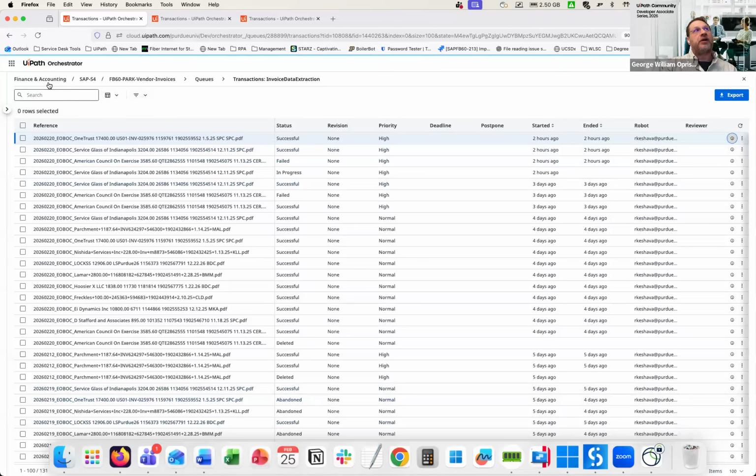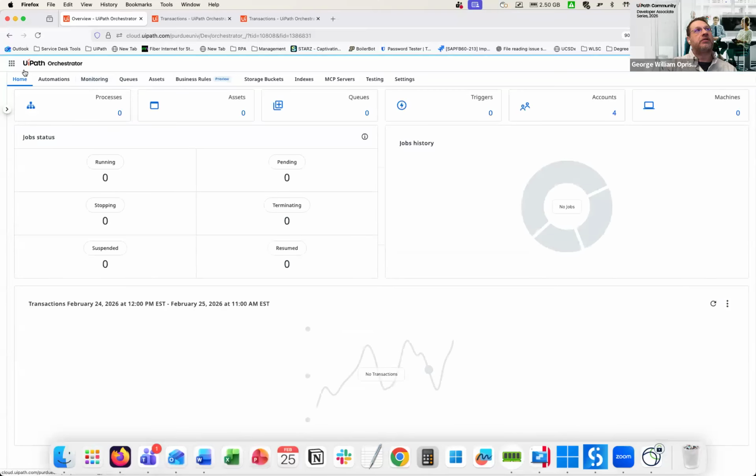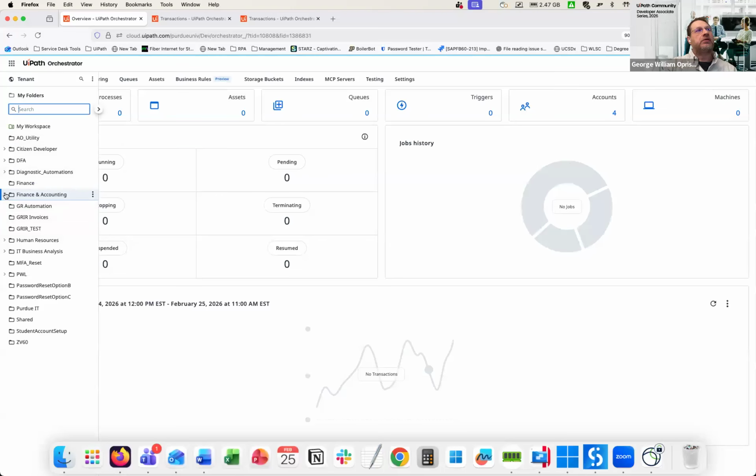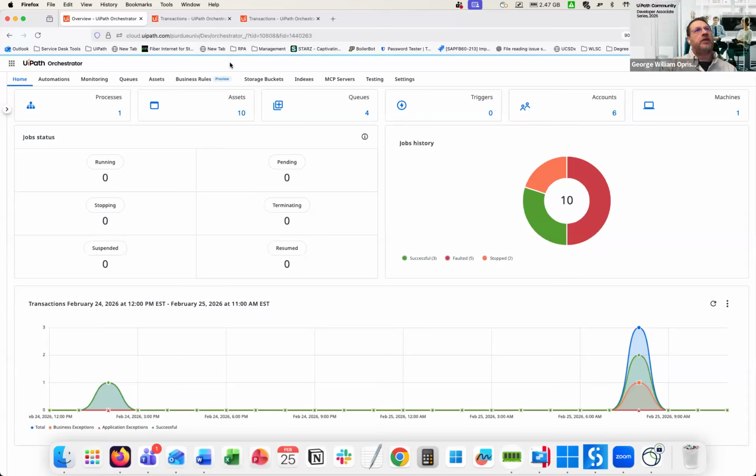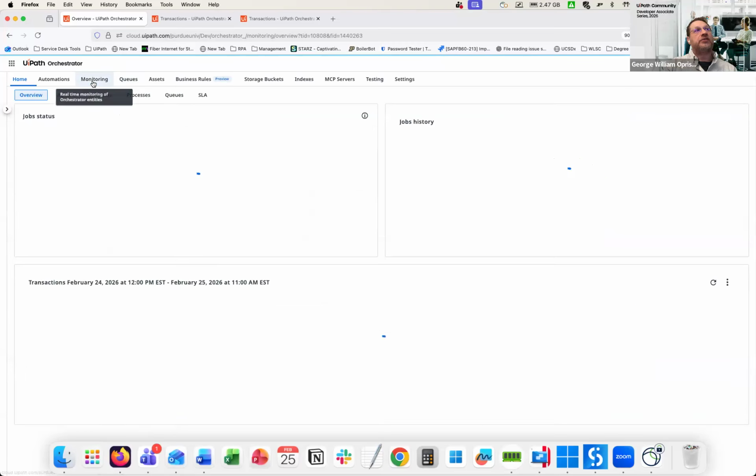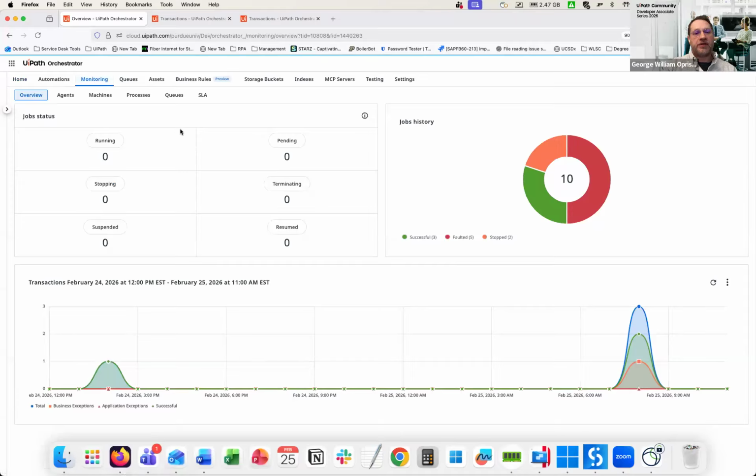And then for hypercare, one of the things that we do, let me go back here, is we just monitor. So we have an agreement, an SLA, with regard to monitoring. At Purdue, it can be a minimum of 2 weeks. It's usually, depending upon the importance of the business area, up to 30 days, which is usually a little bit more than standard, but that's what they want. So that's what we provide.